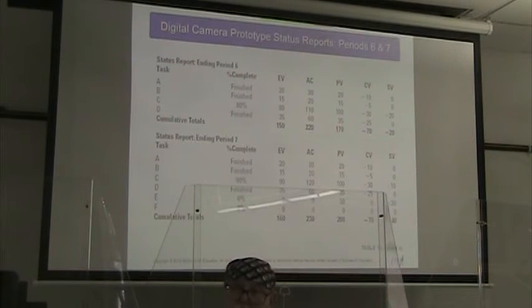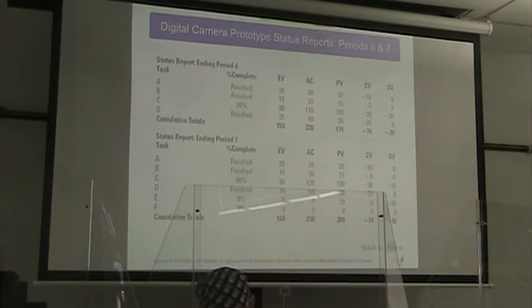What does that indicate? What does that indicate, like the cost variance? Well, the cost variance indicates that we're spending more money than we should be, according to the schedule that we've laid out. And what about when the schedule variance is negative? The schedule variance tells us whether we are ahead or behind on the scheduled spending that we were going to do. Okay.